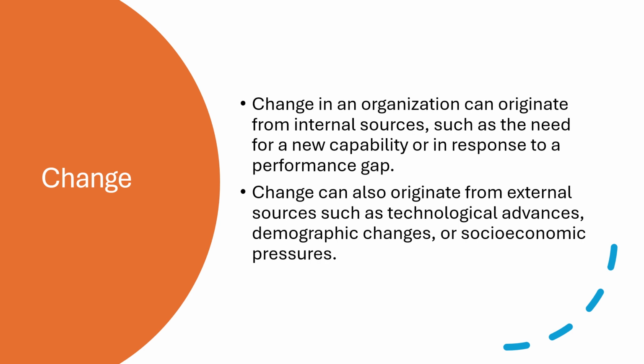So if we're upgrading the software, they need time to learn the software. We don't want to upgrade every single application on their computer at the same time, because then they won't be able to do any work. So we must have some activities that reinforce the change as well, to avoid people returning to the initial state. So they won't let them go back to their old software, for example. Now, recognizing and addressing the needs of stakeholders throughout the project lifecycle helps to integrate the resulting change in the project work, making a successful outcome more likely.